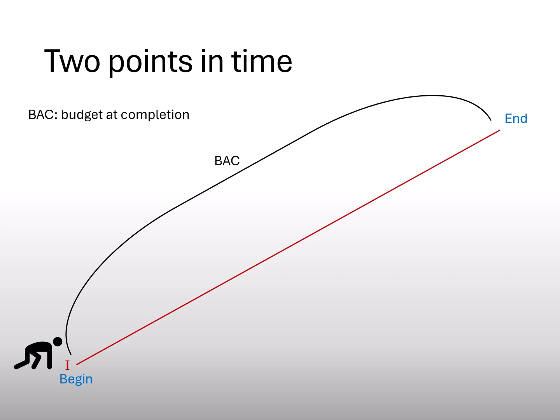And if I have my project divided into activities or components of the WBS, I will call them PV. So BAC should be equal to the sum of all PVs. Now let's move to a different location, midway through the project. From there I could see what had happened and what will continue.